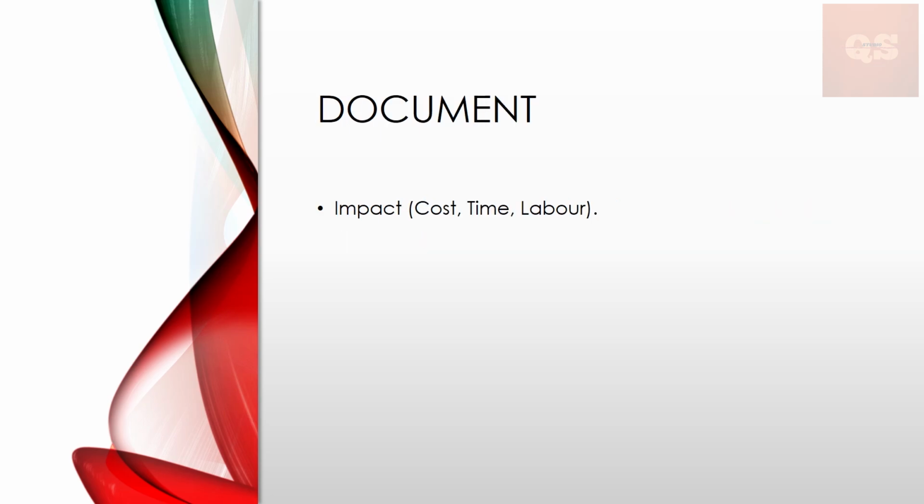Next is the documentation part, which is very important. Definitely an additional change would have an impact on cost, time, labor. These should be analyzed and worked out, like the costing for that new change, what materials would be required, the labor required, if you would require a specialist contractor to do that, and what would be the timelines.